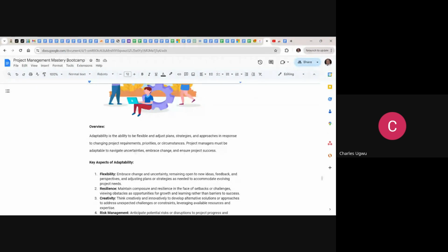Communicate the impact to the stakeholders. And then once approved with appropriate budget, it can be implemented. So you don't have a rigid mind when it comes to change because you're afraid of scope creep. If you manage a change very well, it's not a scope creep because it's addressed.